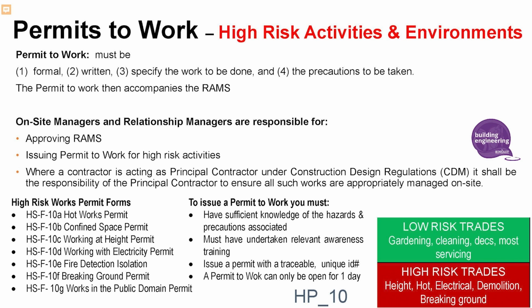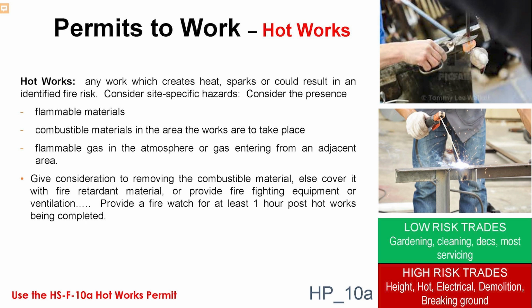So it must be formal, written, specifying the works and precautions. And then it goes to approving, issuing permits and making sure the work's done responsibly. And then here we're getting into the more specific types of high risk work. So obviously hot works are anything where heat or sparks could risk fire, combustion, or flammable materials.